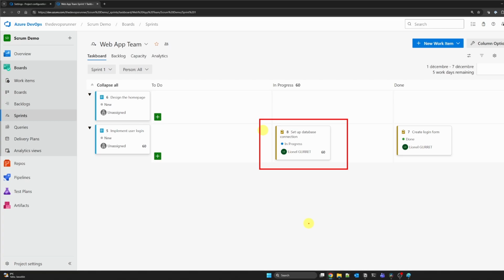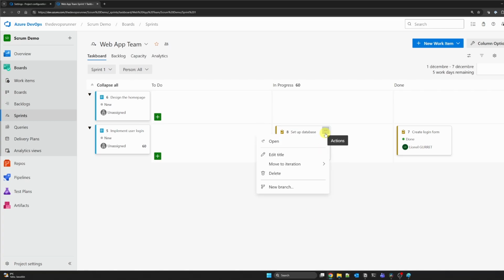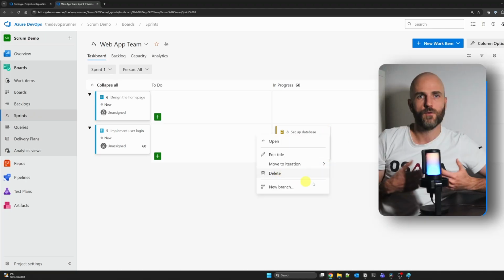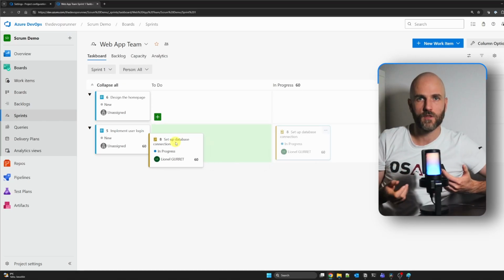It happens. When you go to your project settings to change the dates of your next sprint, Azure DevOps will prompt you and ask what you want to do with any incomplete items from the sprint you just finished. You can automatically move them to the next sprint or back to the product backlog. This little feature prevents work from getting lost in limbo.